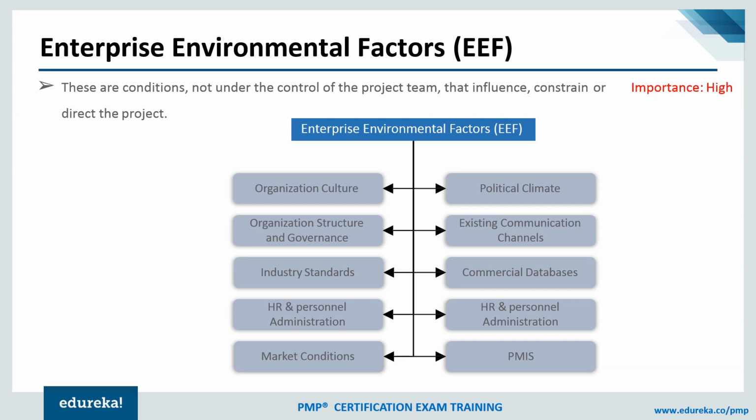You can get approval over email in 5 minutes, but getting approval on a printout with a physical signature may take 2 to 3 days, or a week, depending on which part of the world you are working from. So it is very important and useful to understand enterprise environmental factors, and we will discuss them as and when they are used in our detailed processes.